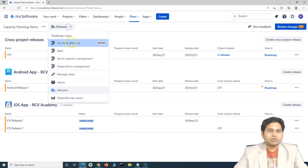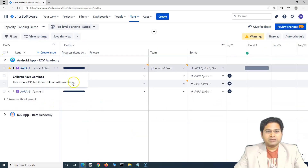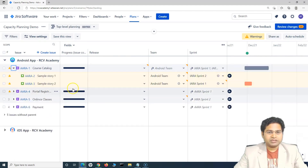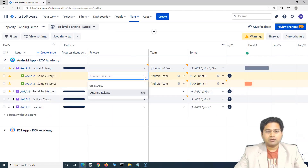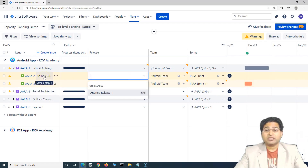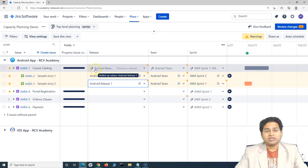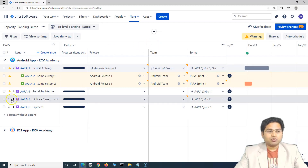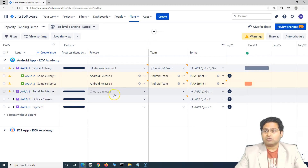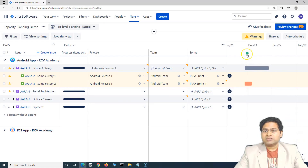This is how you add releases in Jira Roadmap. Now if you go to the top-level planning view, you can associate work items to the releases. The stories that need to go in a particular release can be associated to it. For example, 'Course Catalog' needs to go into Android Release One, so I can associate the release to the work items below this epic, and the whole epic will be associated with Android Release One.